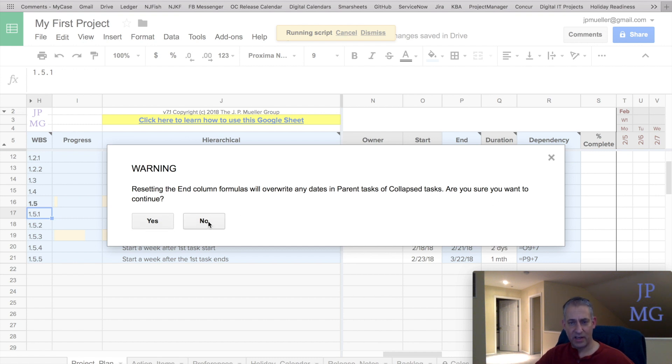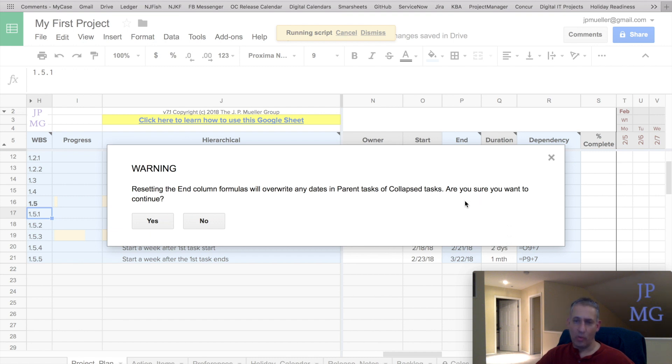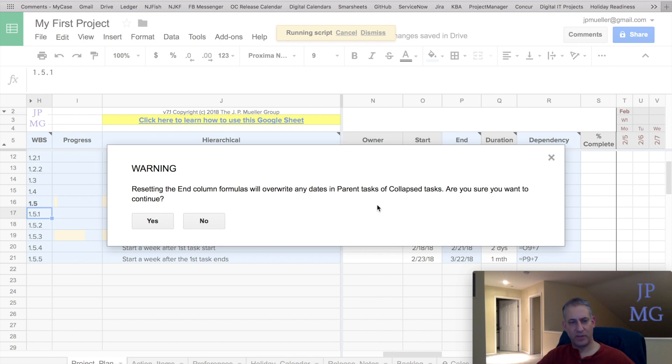And I hit yes before. I could hit no right now, and it won't override that collapsed min and max function. However, it also won't fix the formulas if you have any broken formulas in the end column. So it's kind of a warning. It lets you know that you may have to manually fix a few things.